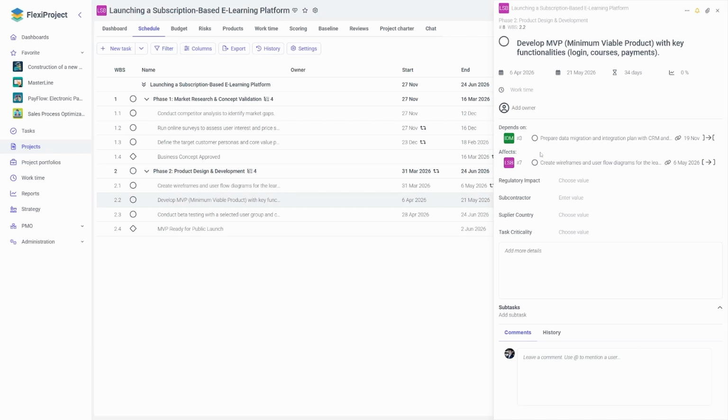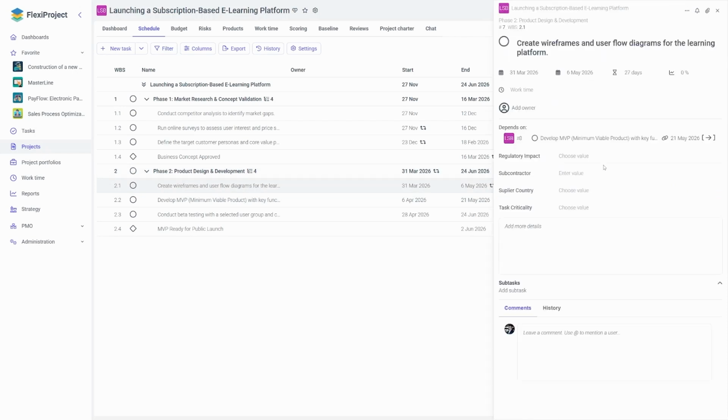It is worth noting, however, that when we create a link between projects in this way, it is only informational for us at this point. That is, these tasks will, of course, have information that they are dependent on each other. However, any changes, such as when we had shifts of some elements on the schedule in the case of delays or an earlier start of a given task, will not take place in this case because this data is only for our reference and awareness. It only has informational value about the connection, but without mutual impact on the schedules.